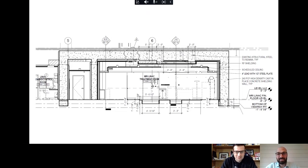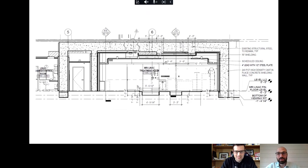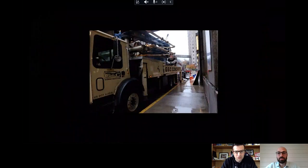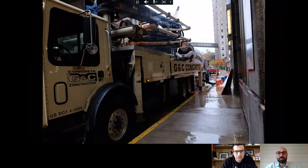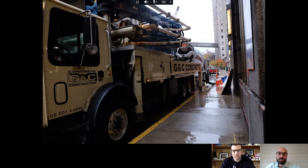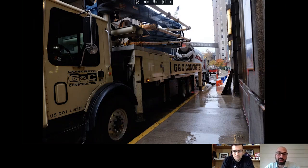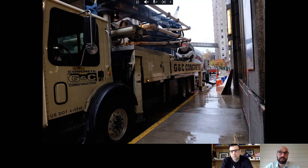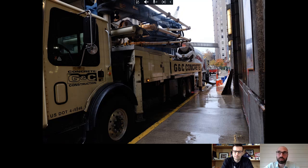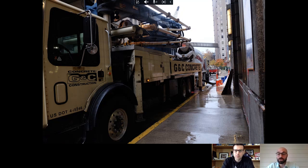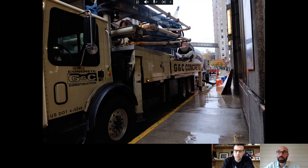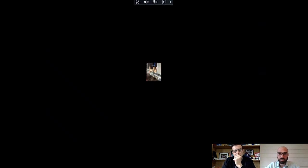So you touched on something already, but the concrete pump truck, we sort of leveraged, every MRI has a quench vent, because it's a container of helium under high pressure. So if there's any issue with helium liquid, it needs to be off gas somewhere, otherwise it's a dangerous situation. So we already had to build a shaft to contain the quench vent, and it just happened to bring us up through the ambulance bay. So we had good access, we already had to build the shaft in order to do that work.